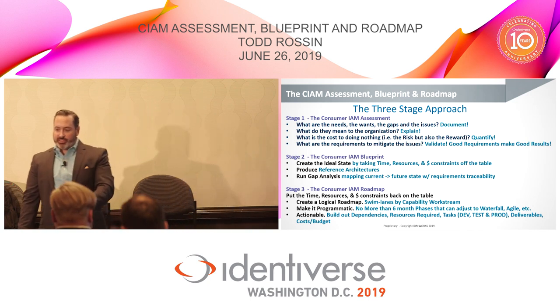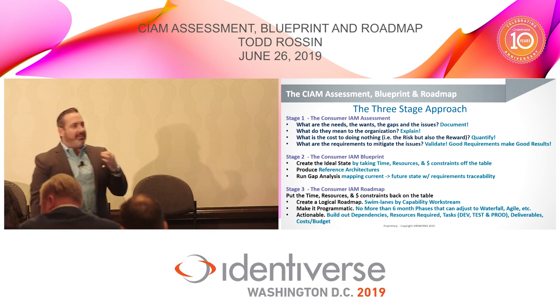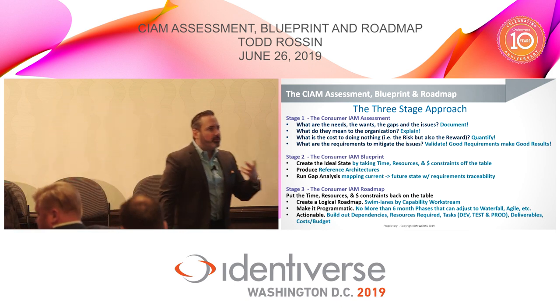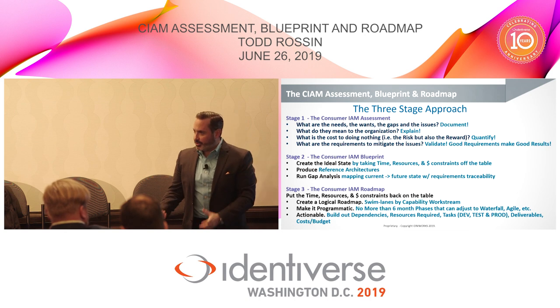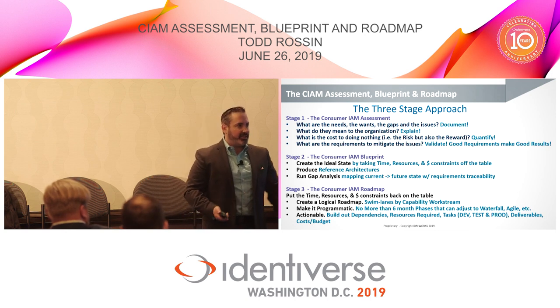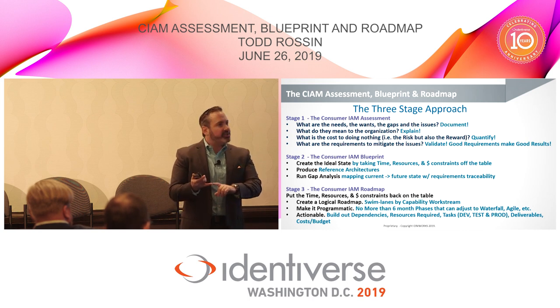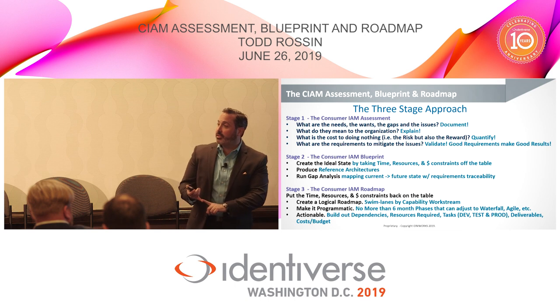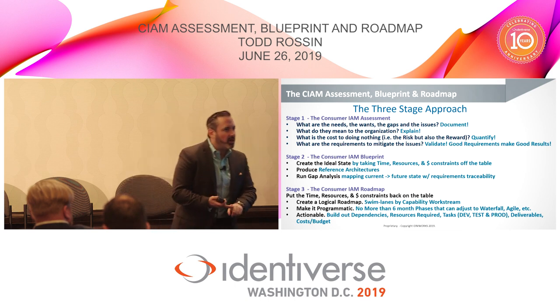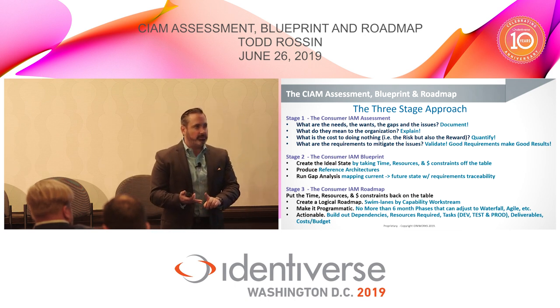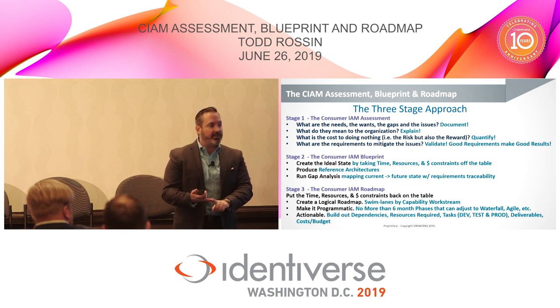So, build this out, and then every item within your roadmap you have to treat from a project perspective. And why I say that is this. Take that individual project and build out what it's going to take to do. So, first, what are the constraints and dependencies? If it's technical, dev to test to prod, what are the steps? High level. I mean, we're not talking vendor yet. Don't talk vendor. You're going to plug that in after. Next up.